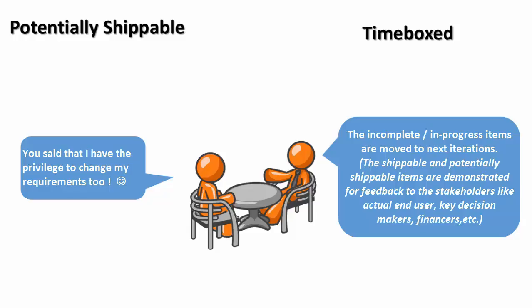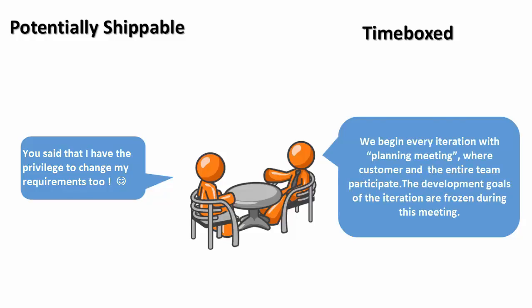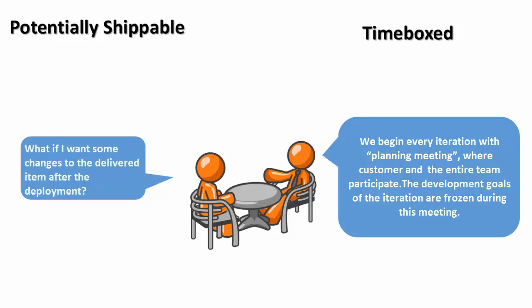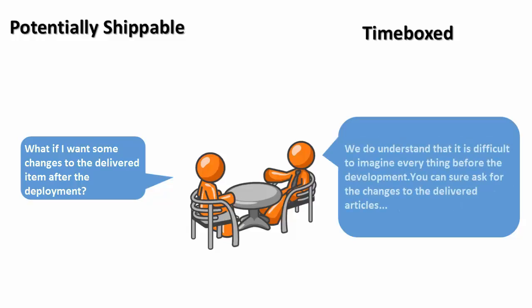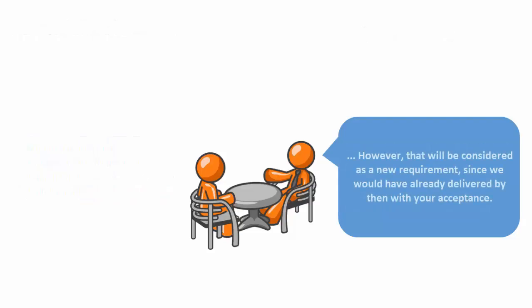You said I have the privilege to change my requirements. We welcome changing requirements and make the customer a part of our team. We begin every iteration with a planning meeting where the customer and the entire team participate. The development goals for the iteration are frozen during this meeting. What if I want changes to delivered items after deployment? You can ask for changes to delivered articles; however, that will be considered a new requirement since we would have already delivered with your acceptance.